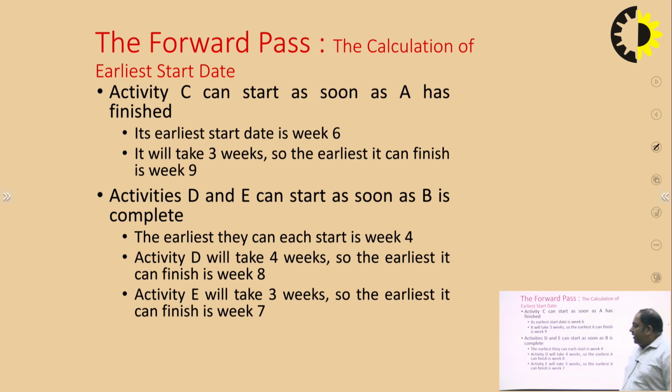In the same way, activities D and E cannot start until B is complete, so the earliest they can start is week 4.